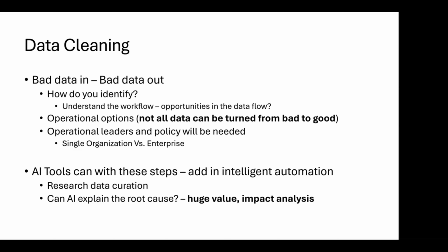A lot of times matching DICOM data to some other external source, the EMR. Nowadays we have FHIR, so you can get something and check real fast. There's a lot of ways to do it, but I would just offer, think through the data flow, the sources and destinations, and opportunities where you can have multiple checkpoints. You get the highest quality if you have that. There's also operational considerations. Not all data can be turned from bad to good. Like, do you need those QA systems for the CT scanner from 10 years ago that you decommissioned a few years ago?